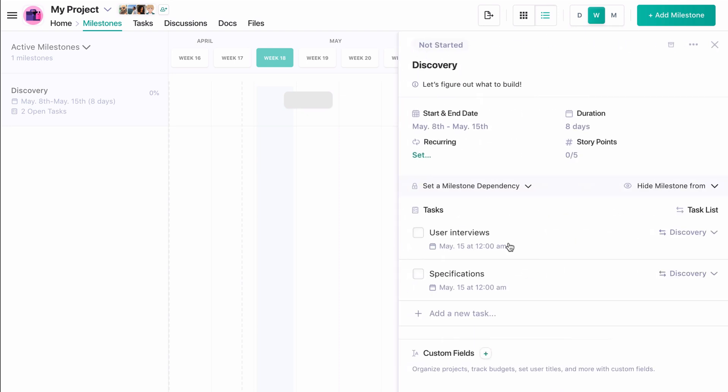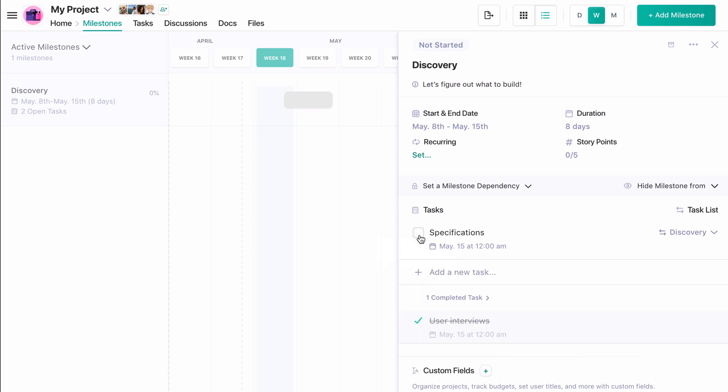Now we have a total story point weight of five points on this milestone. When we complete user interviews, our milestone shows as in progress, 50% because we've finished one out of two tasks, and reflects that we've accomplished two of the five story points in this milestone.